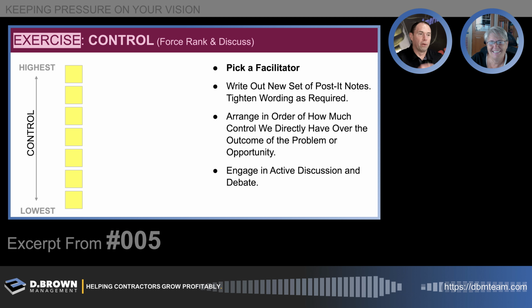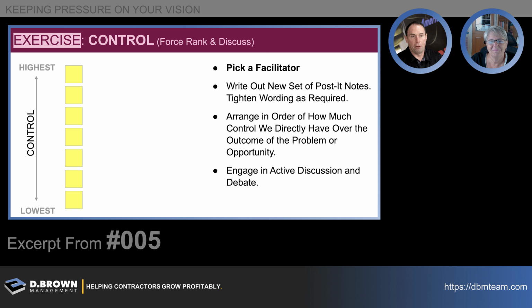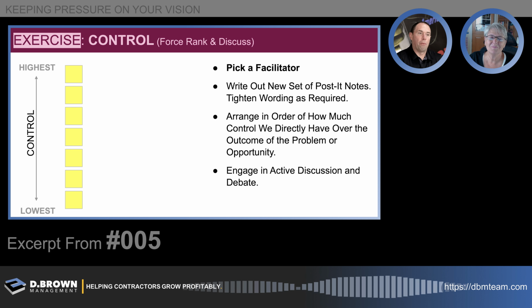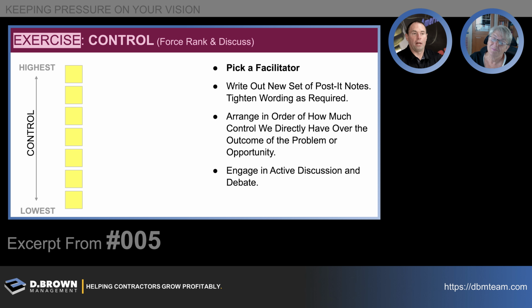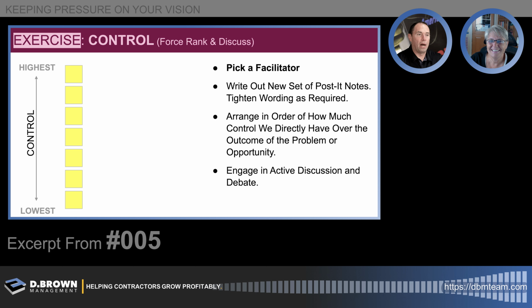Because this factors into your risk, your probability of being able to change the outcome. And if it's an issue where you need the customer to act perfectly 100% of the time, and that's the only way the math works on your prioritization, yep, just kill that one. Move it to the kill category. So arrange it, have the discussion, get into the why, ask questions.